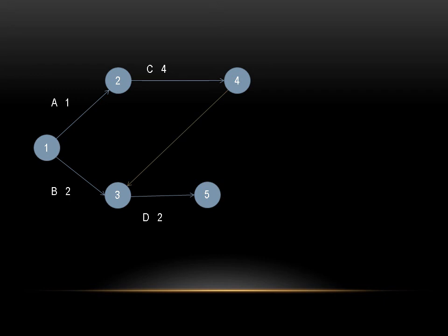It is just because in the table you can see another activity E is preceded only by C. So if we put an arrow here and write D and E both, then E would be preceded by both B and C. That was not true. E is only preceded by C and D is preceded by C and B. You get it? D was preceded by C and B and E was preceded by C.